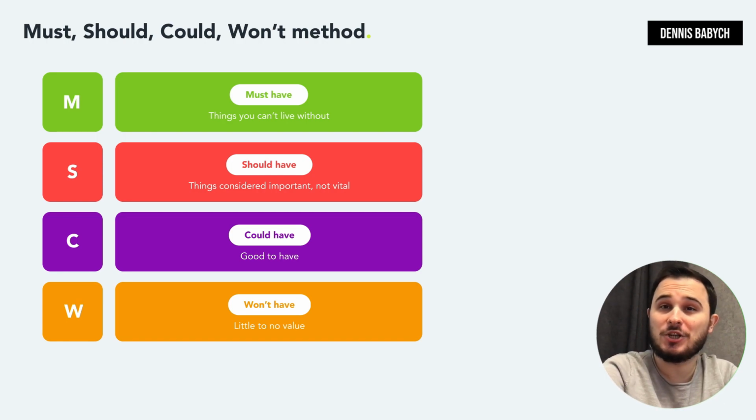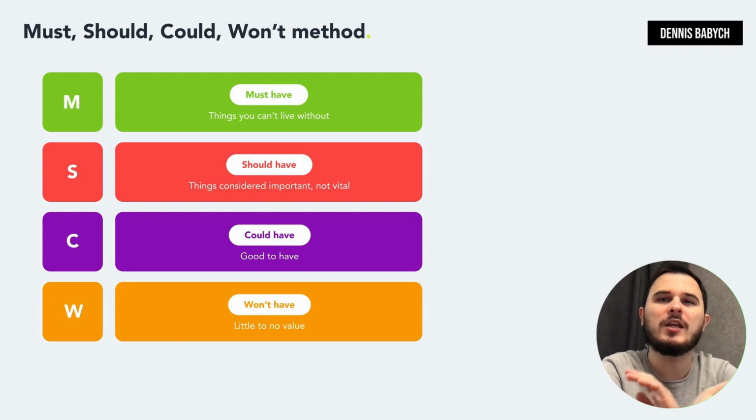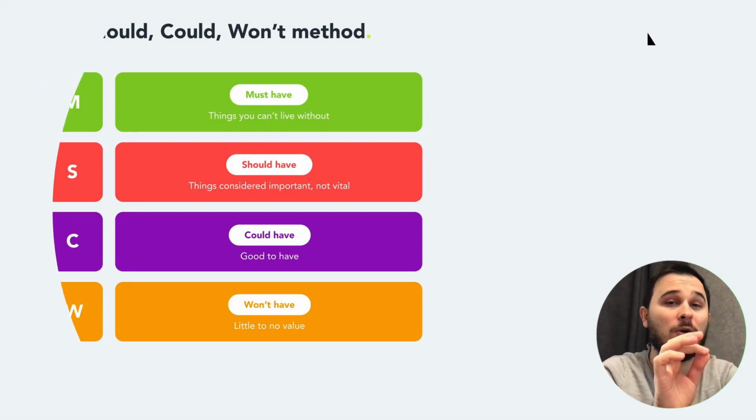Okay, once you've done a deep dive into your competitors, pinpointed all your customers' issues, and come up with a bunch of solutions, it's a perfect time to properly prioritize your software features. You'll have to figure out which features are must-have, should-have, could-have, and won't be developed. This savvy approach not only gives you a solid game plan for the essential features your app needs without busting the budget, but it also lets you pivot as necessary without burning through all your resources. Plus, it helps you find the path to your app's core idea and crystallize your project's main objectives, translating them into the software features that should be on your development list.